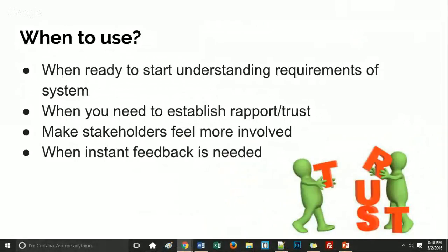So when to use it? The interview technique is most appropriate when the project has progressed beyond trying to understand the problem and you're ready to start understanding the specific requirements of the system. A good technique when interviewing is to have two interviewers present so that they can pick up on things that the other one would have missed. This can also help to shorten the amount of time it takes to get the appropriate requirements.